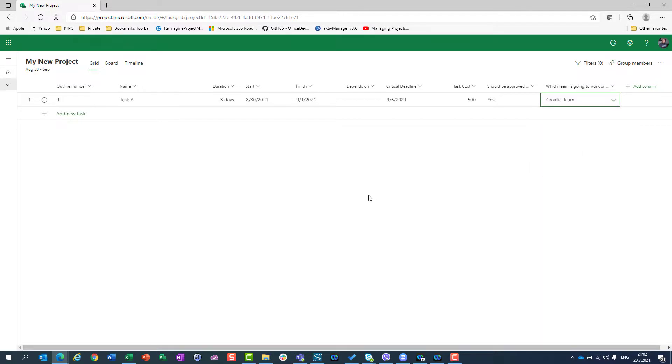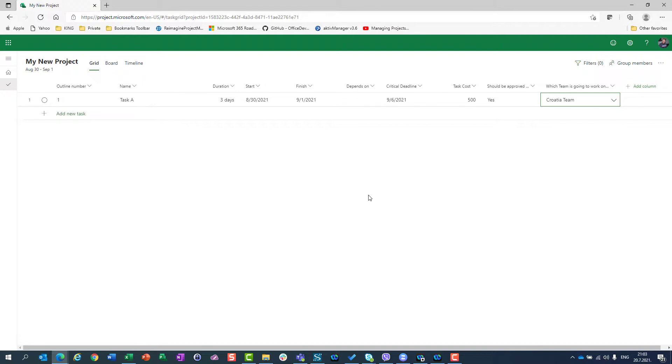So there are two things. You can copy your project and have all tasks copied. If you copy all tasks, you can rename the project and then delete some tasks, modify some tasks, add new tasks - whatever you want.